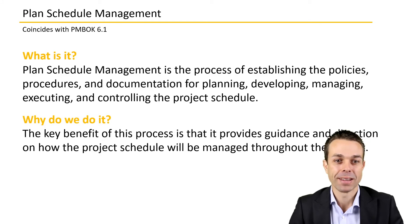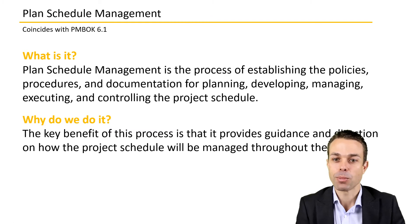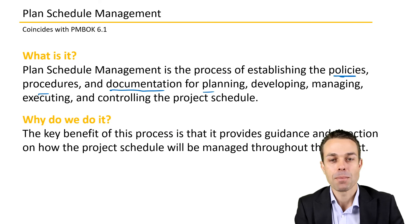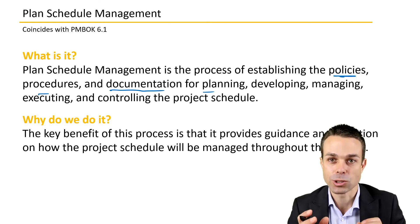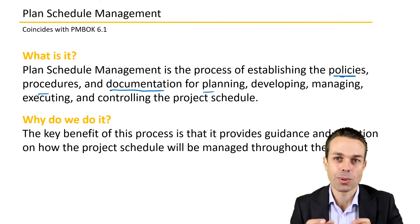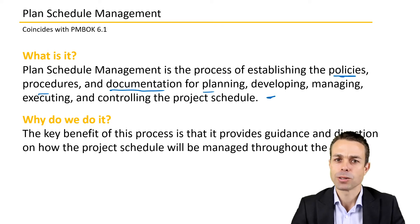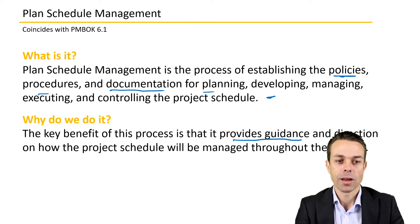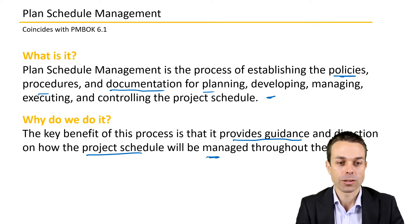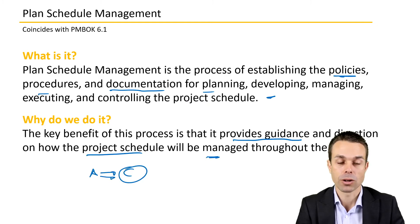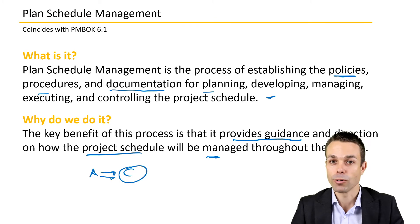What is Plan Schedule Management? It's the process of establishing the policies, the procedures, and the documentation for planning, developing, managing, executing, and controlling the project schedule. We do this because it provides guidance and direction on how the project schedule will be managed throughout the project — how will the activities be outlined, how will they be controlled to make sure that everything is on track, who will be involved, and what's the process.